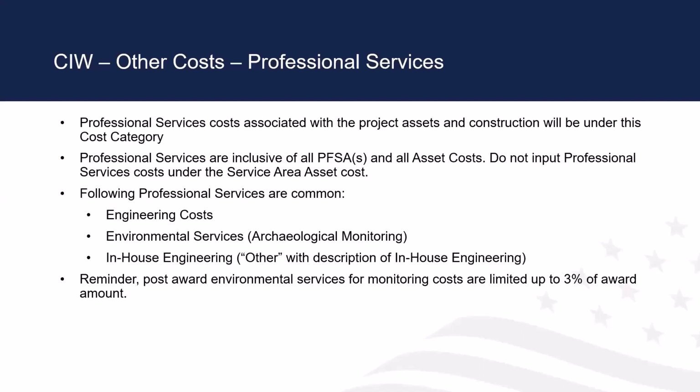Some examples of those, like I said, of professional services are the engineering costs, archaeological monitoring, environmental services, in-house engineering. And again, a reminder that post-award environmental services are limited to 3% of the award amount.